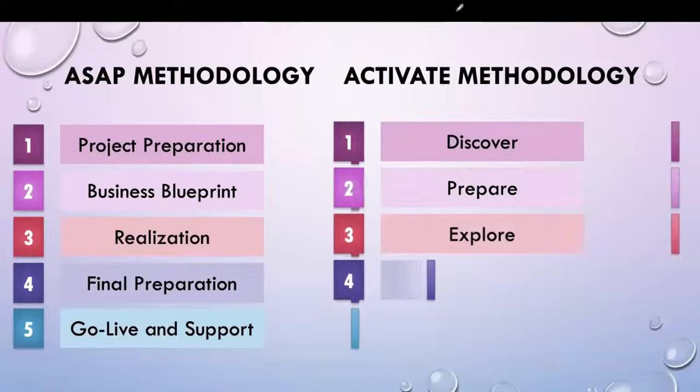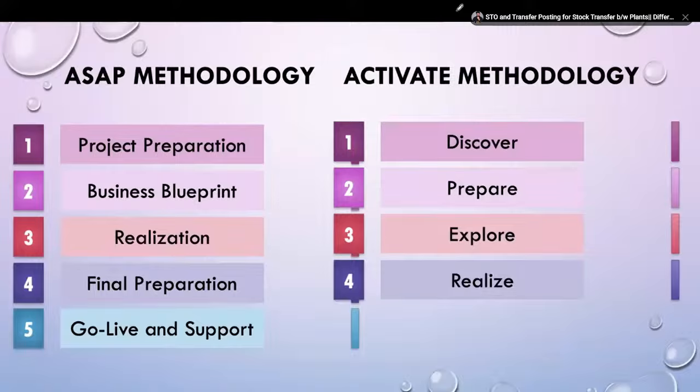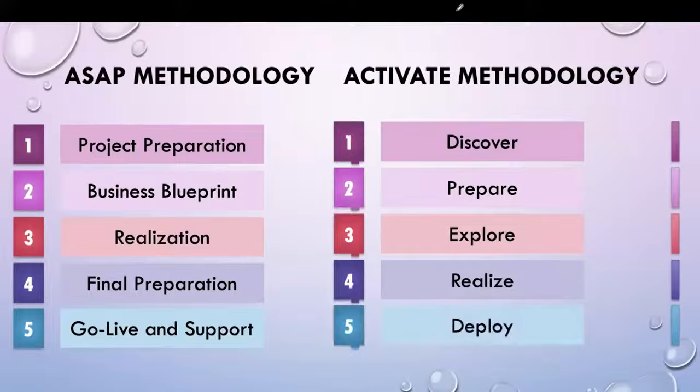And explore and realize. This explore and realize will look somewhat like our realization phase activities, like all the configuration, testing, unit testing, and system integration testing. All those activities are involved. In the deploy phase, how we move before go live, how we do the cutover activities and move transport requests to production.